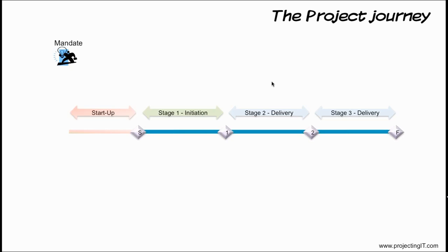Corporate or program management sits above the project board, but they are not involved in the project decision making. They set controls at the project level and they delegate the project to the board. They commission the project and sit outside the project. The projects are triggered by the corporate or program management and they provide a project mandate. A mandate provides us with the terms of reference. It tells the objectives of the project, or in its simplest form can provide the problem statement.